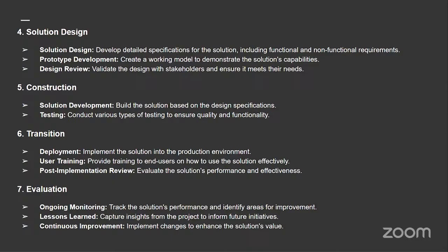This is where lessons learned comes in. You capture insights from the projects to inform future initiatives. Maybe when you are trying to implement the process, you encounter some problem, and how you resolve it has to be noted down so that in future cases you won't run into such trouble again.